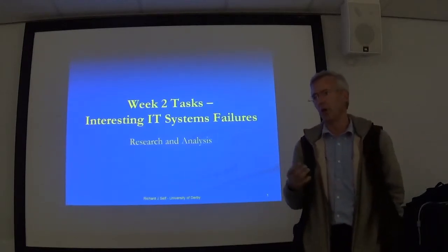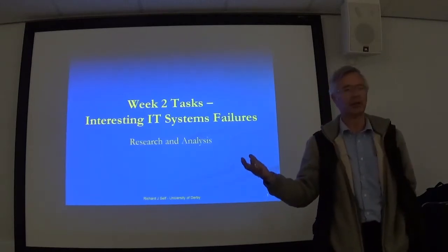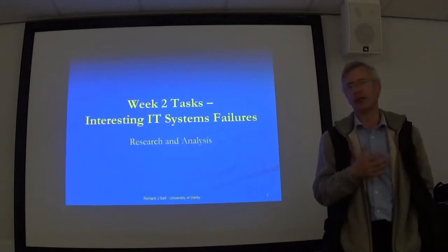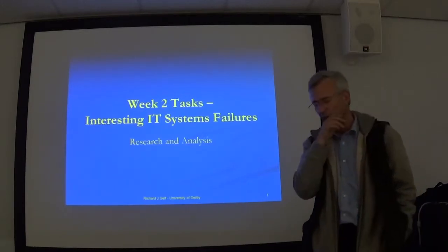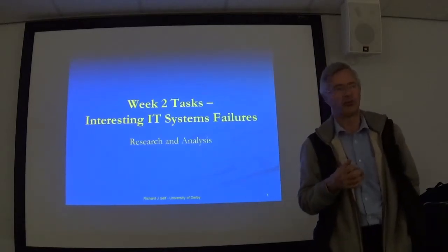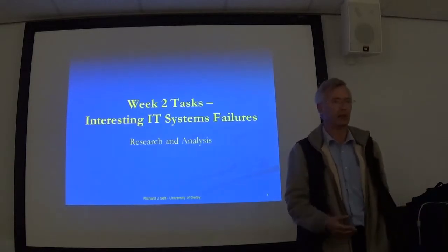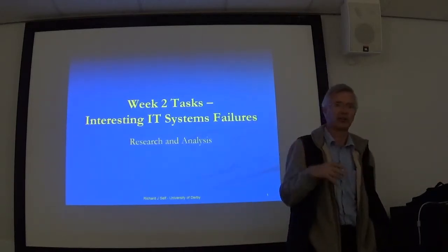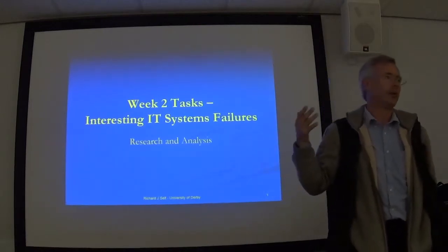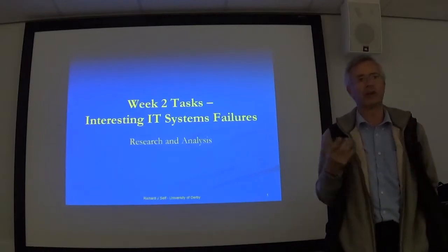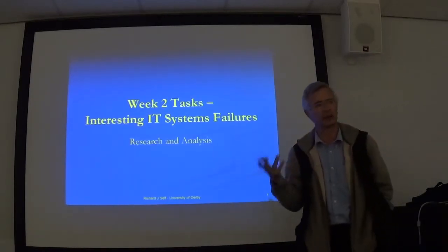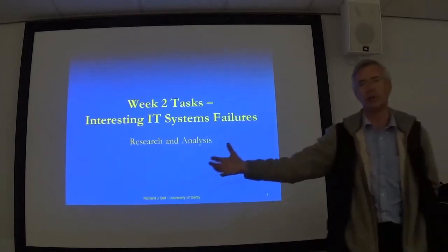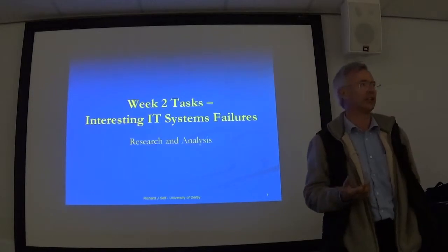A key foundation is the fact that 60% or more of all IT-related projects ultimately fail in one way or another. The Standish Group has been researching and reporting through their annual Chaos Reports since 1994, categorising projects into three categories. A successful project is one that is on time, meets the budget, and delivers all of the contracted functionality. At the other end are outright failures, where nothing gets delivered and the project may be restarted several times but never actually used.